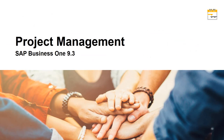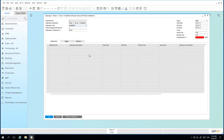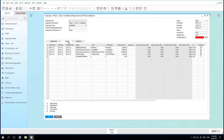Let's have a look at this business scenario in SAP Business One Release 9.3. We are now logged in as Jason Butler. A project has been created for the customer Parameter Technology for the installation of two servers and a series of printers. Under the project window you can see the sub-projects with different phases: Server 1 installation, Server 2 installation, and Phase 3 consisting of the printer installation. If we drill down into the sub-projects, for Phase 1 for example, and under the Stages tab, you can view the stages in detail and any stage dependencies, meaning you can define dependencies across different sub-projects to ensure they are completed prior to moving on to the next stage.